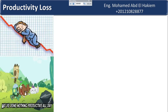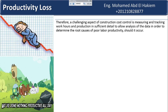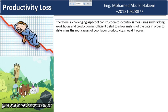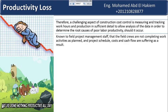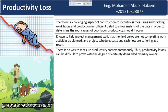A challenging aspect of construction cost control is measuring and tracking work hours and production in sufficient detail to allow analysis of the data in order to determine the root causes of poor labor productivity, should it occur. Field project management staff may know that field crews are not completing work activities as planned, and that project schedule, costs, and cash flow are suffering. There is no way to measure productivity contemporaneously, thus productivity losses can be difficult to prove with the degree of certainty demanded by many owners.